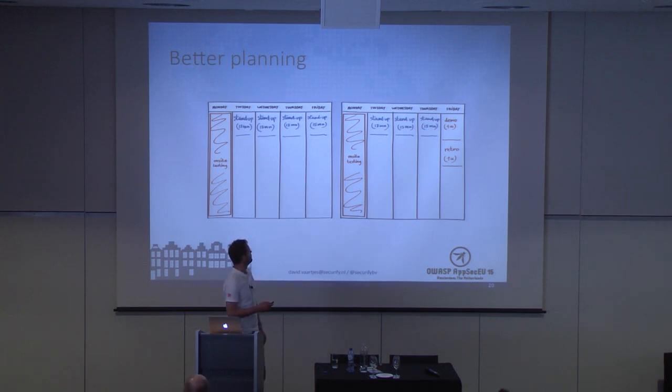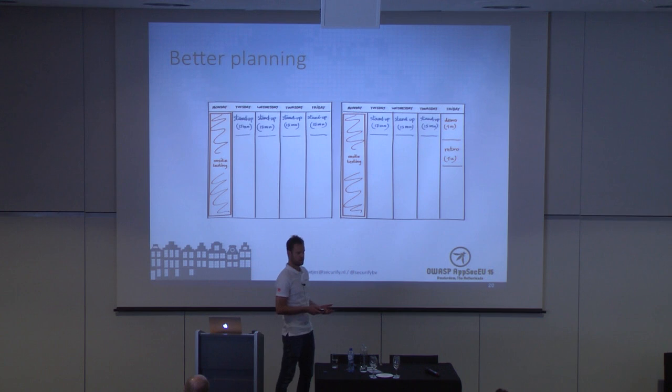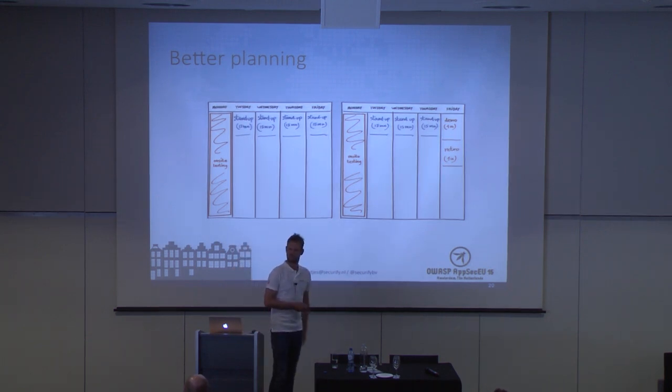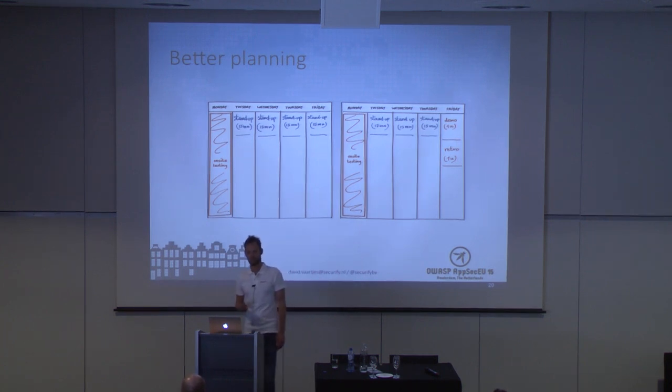So then we spent 8 hours a week on a team, and we were able to do all security testing fully during the sprints in this one day. If you compare this to the security test we did, which took about 5 days, and a sprint is about 2 weeks, we were getting a bit more efficient in time costs as well.